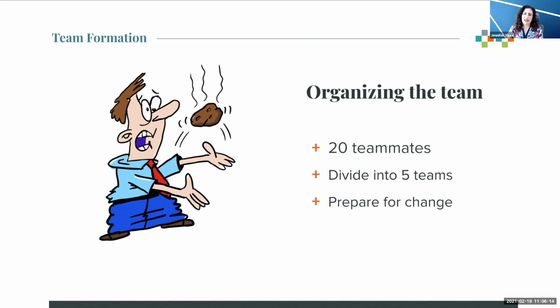What we realized is that since we had these 4 teams operating, we needed a way to coordinate the work. We needed to establish communication across the teams. So we created a 5th team called the Team of Teams. This team was looking at the overarching work, looking at overarching blockers, and met on a daily basis with 30-minute scrums to catch each other up on information that perhaps other teams were talking about that needed to be bubbled up.